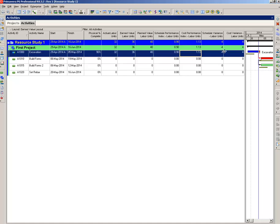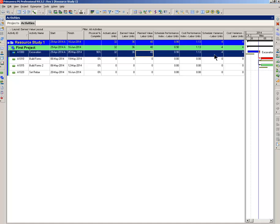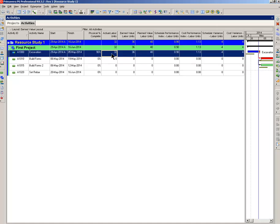On a schedule variance, we are 4 hours behind schedule. There's nothing more than the earned value minus the planned value. Cost variance, another simple calculation. This is earned value minus the actual labor cost. That gives you 4 to the good. Very simple, very effective, but this tells you exactly what's going on.